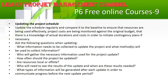Updating the project schedule is a system you should agree on with your project manager and based on your contract. You need to decide how often you'll do the progress update, what methods you'll use, and what information you need from the foreman, project manager, and site team. Always make it simple — don't create a spreadsheet with hundreds of columns, or no one on site will help you.